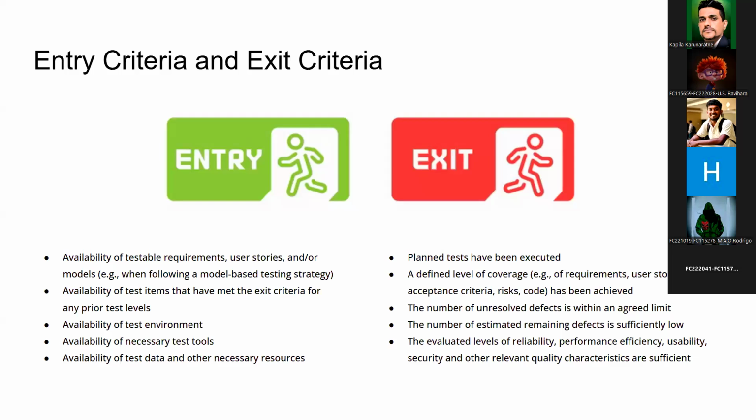Then you can call it out: my exit criteria is zero high and critical defects. If it is mentioned in the document and everybody agreed, that's industry standard as well. Ideally, if there are open critical and high defects, it is not allowed to release for go live or production. So if we have documented it clearly in exit criteria and everybody agreed in the beginning,